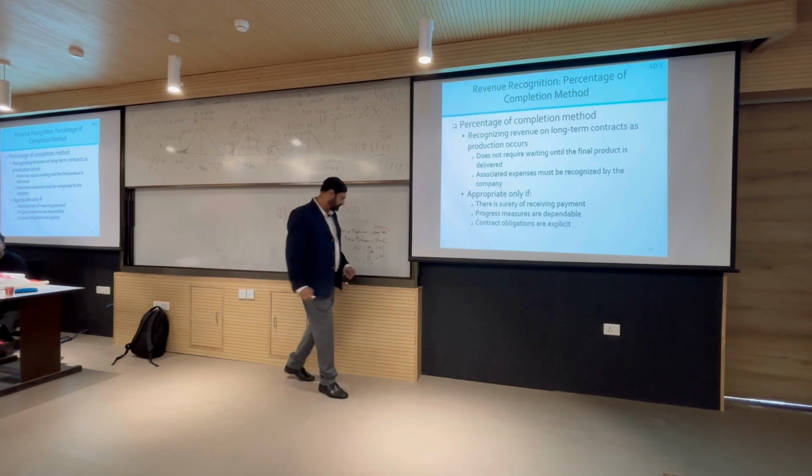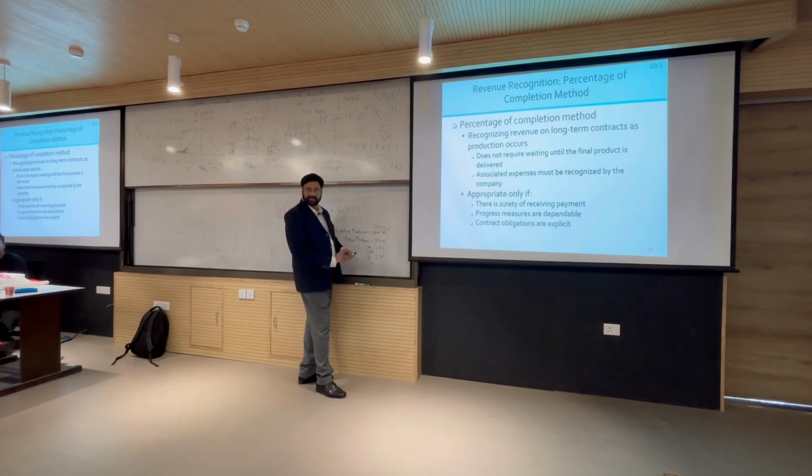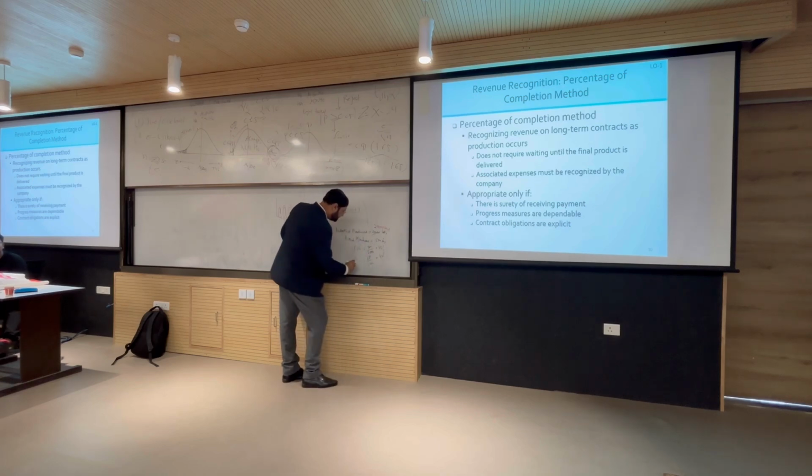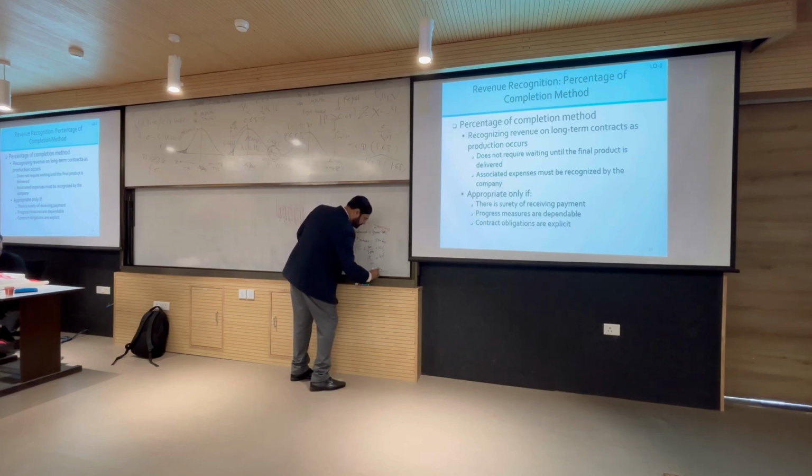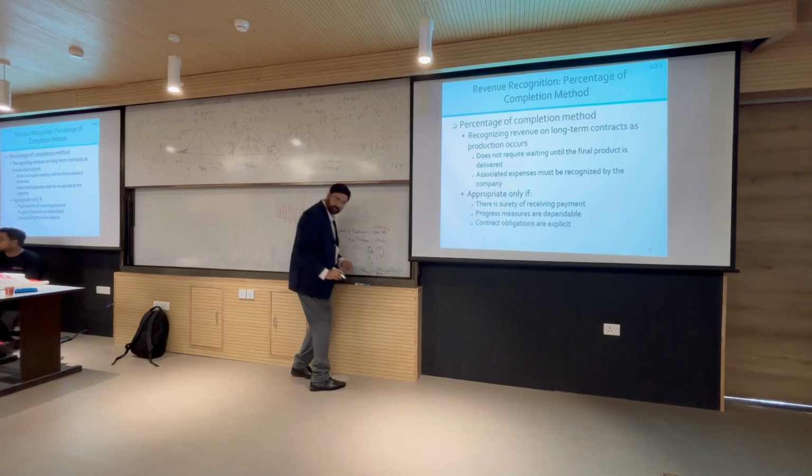So, in such a case, what will happen is, this was the case if there was no change, but if there is change, then POC is how much? POC in case of change in estimate, I am just writing change is 800 is okay, but budgeted is not 2000, it is 2400 now. So, we have POC as 33.3%, right.